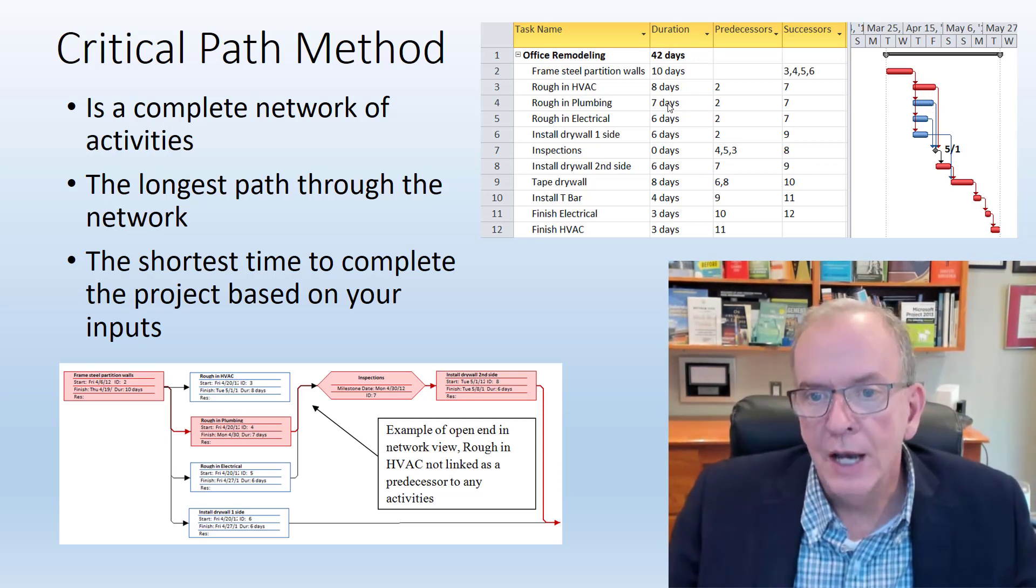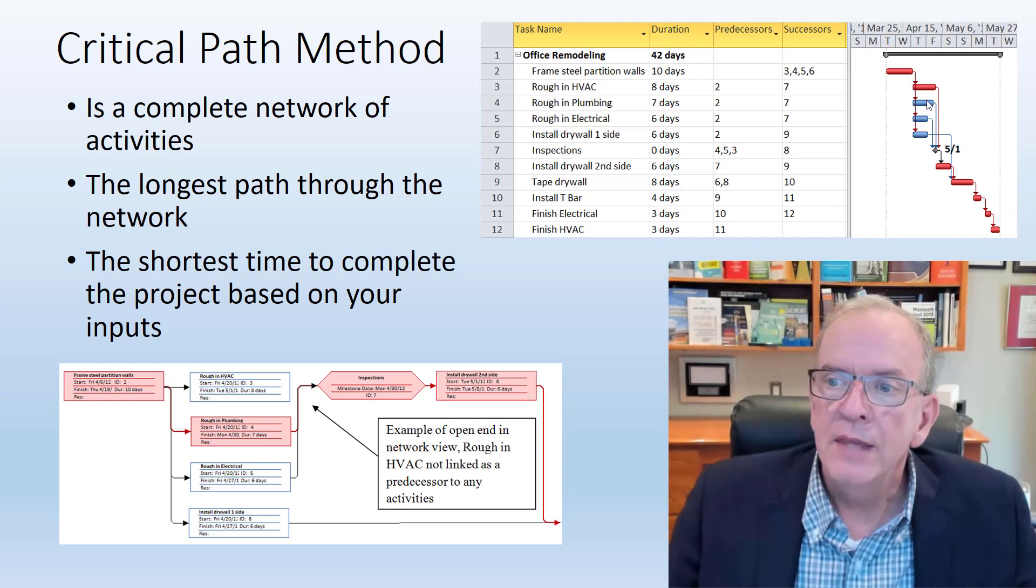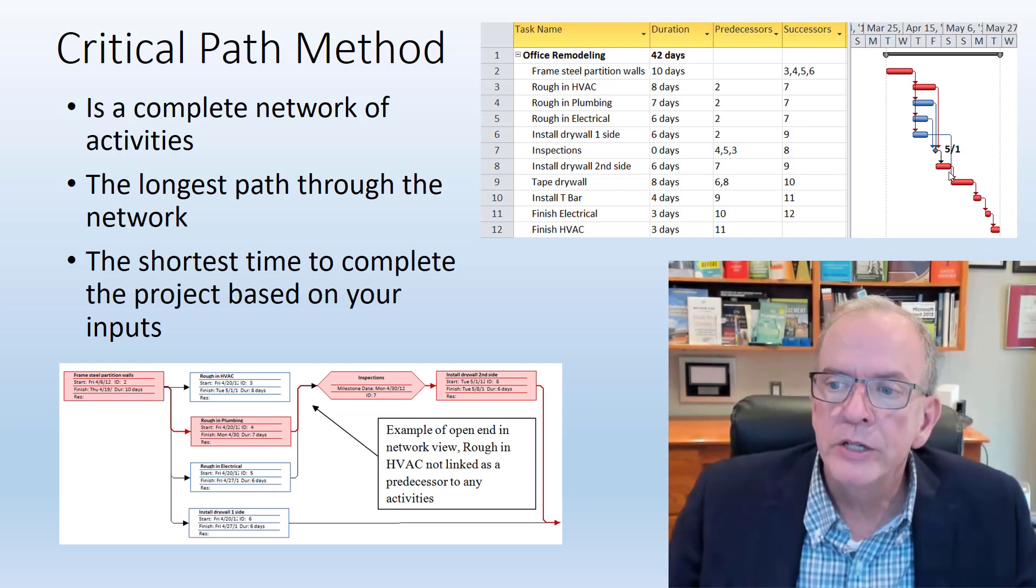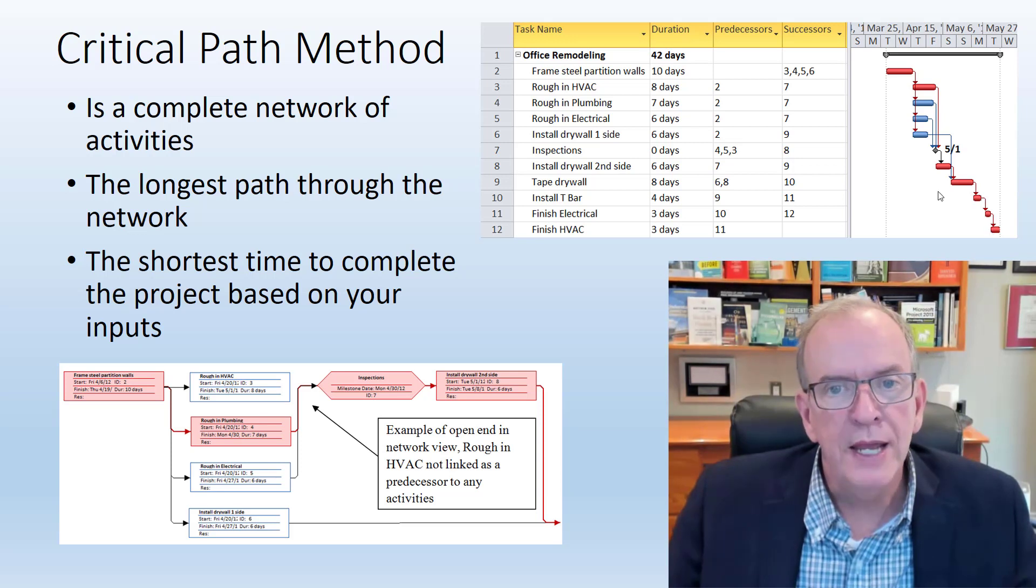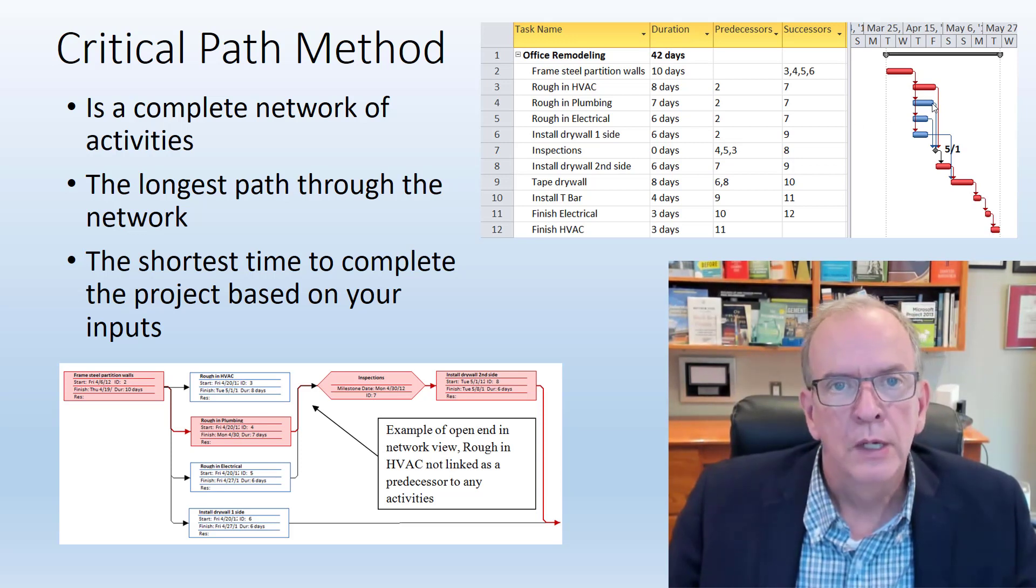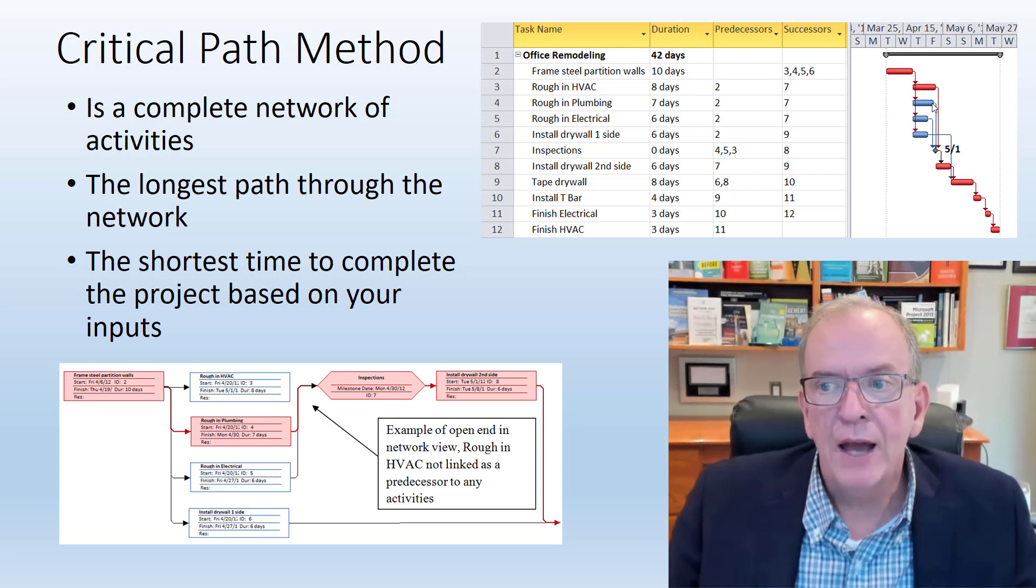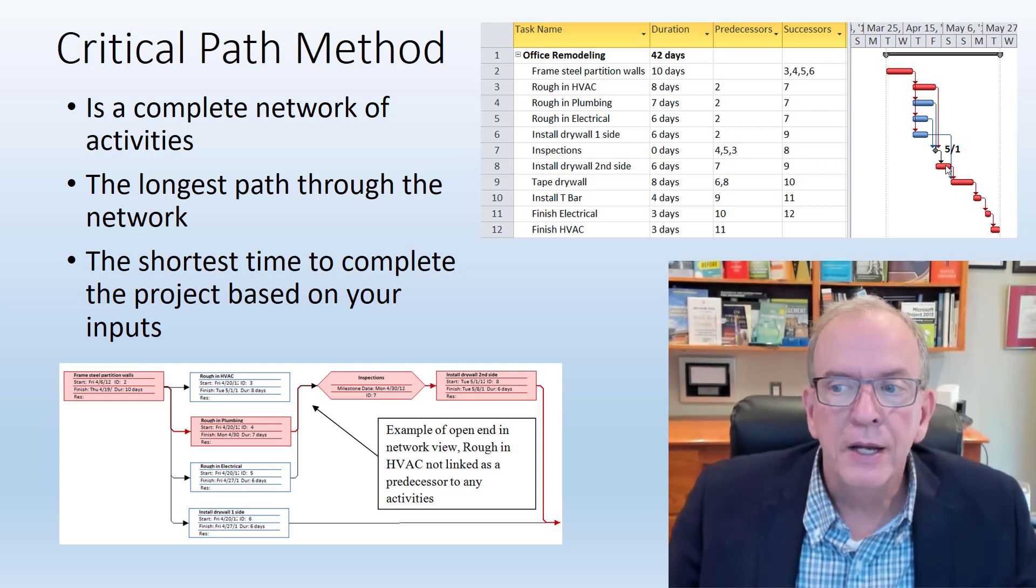If it took nine days instead of seven days, it would push out my project finish date by one day.